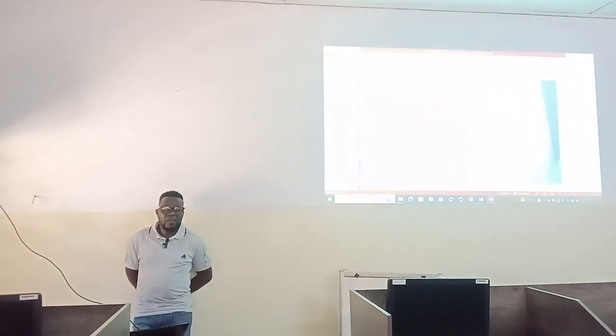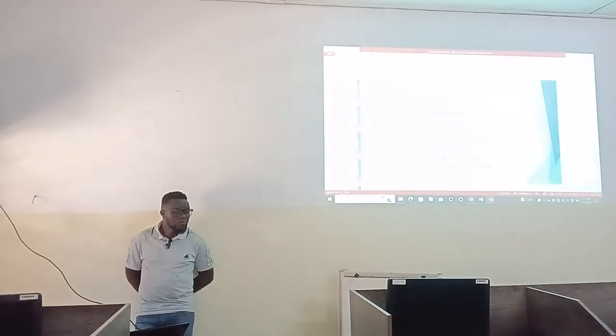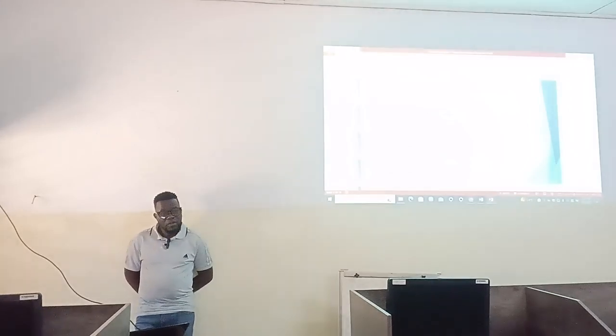An interesting thing with risks is that they are always there, will always be there. All we do is to minimize them or else to mitigate them. But actually, you cannot stop a risk from happening. We are assuming that here is the manager, production manager, or maybe the chief engineer of whatever activities are happening here. Then death strikes, the person dies. Nobody can stop the death from happening. It will still happen. It will strike this guy down, fine. But now, what do we do for us to keep going? You need to find a way that you should keep going. Either you replace somebody, you find another engineer to carry on with the work, or else you train somebody so that should this guy die or should this guy leave this place, this one is going to take over. Just examples of risk mitigation measures, right?